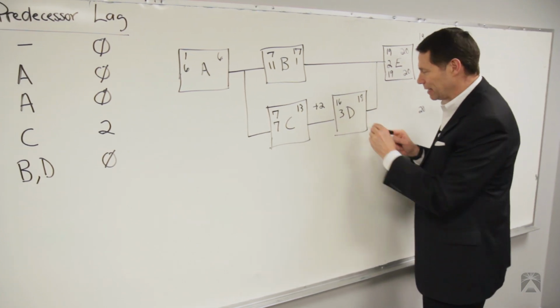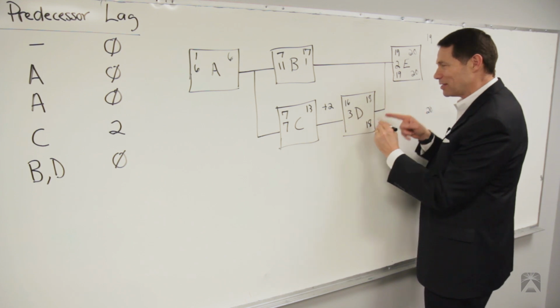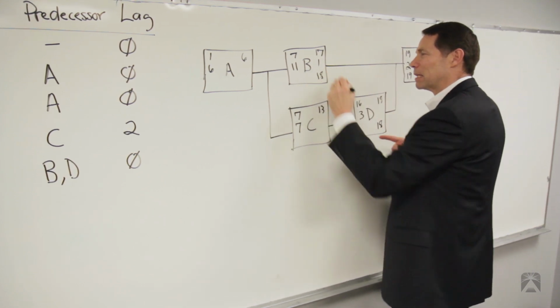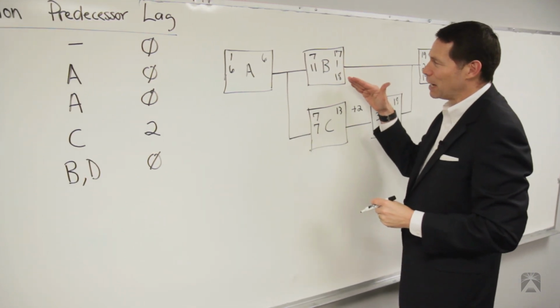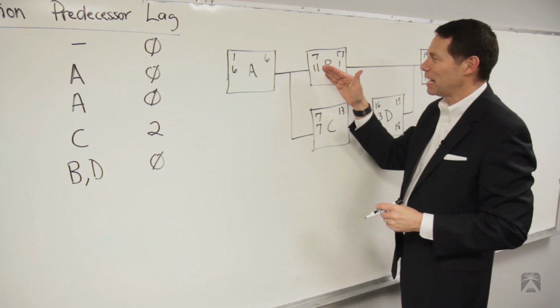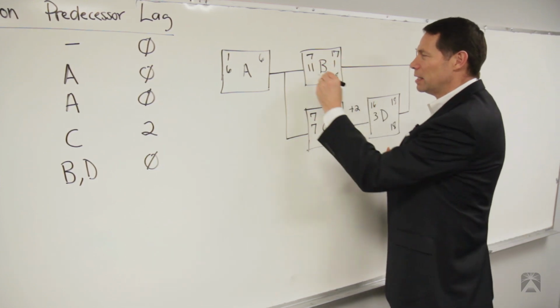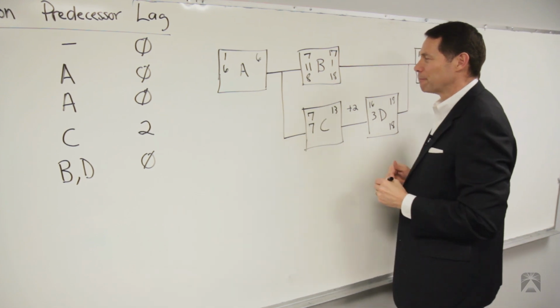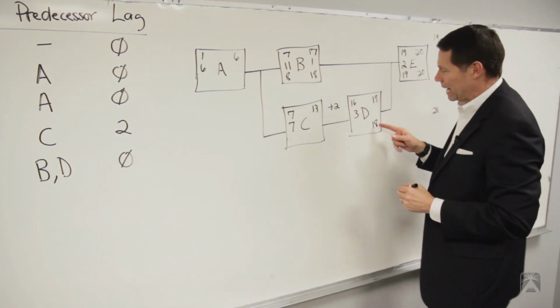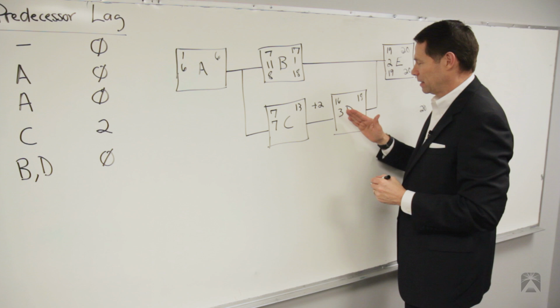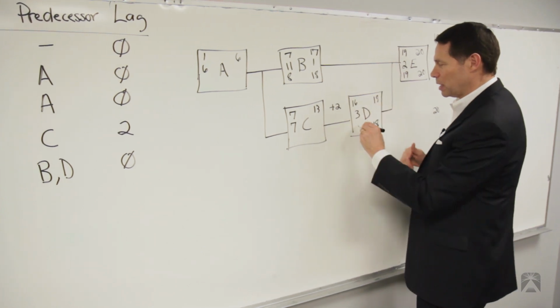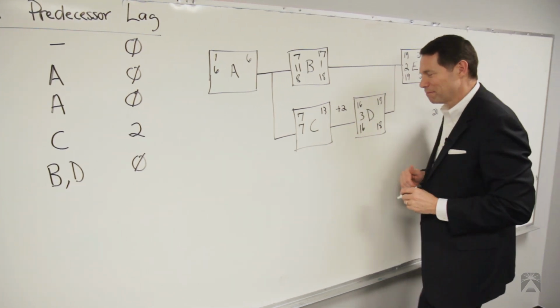Well, it's going to be 18 because I need that 19, so 18 goes here. Let's go ahead and take care of this one. 18 minus 11, what do we have for that? Okay, so that would be 7 plus 1 goes to 8. And we've got the 18 minus the 3. Okay, so that'd be 15 plus 1 goes to 16.